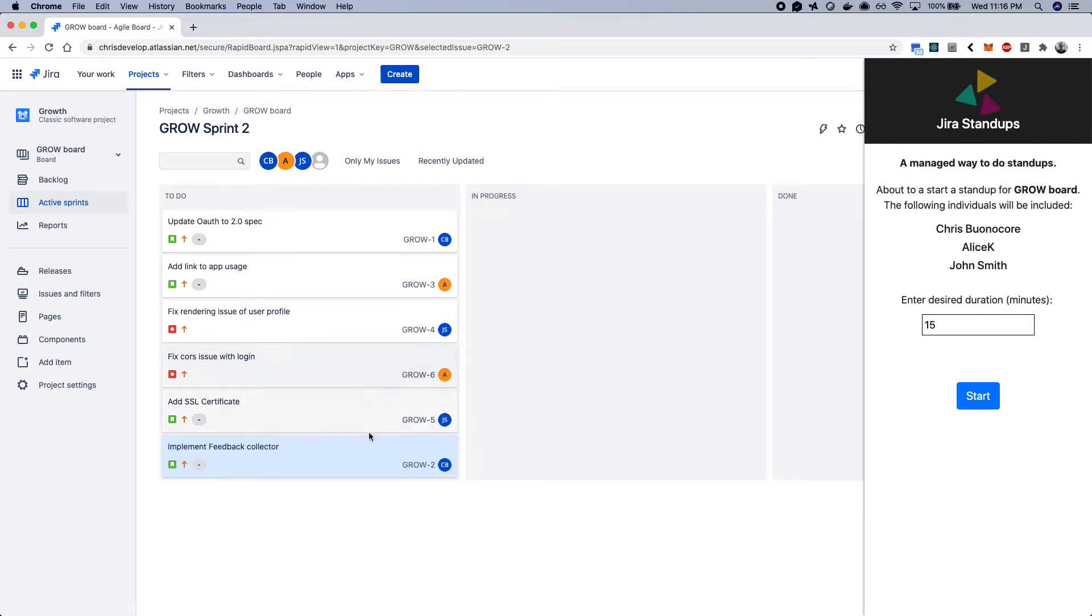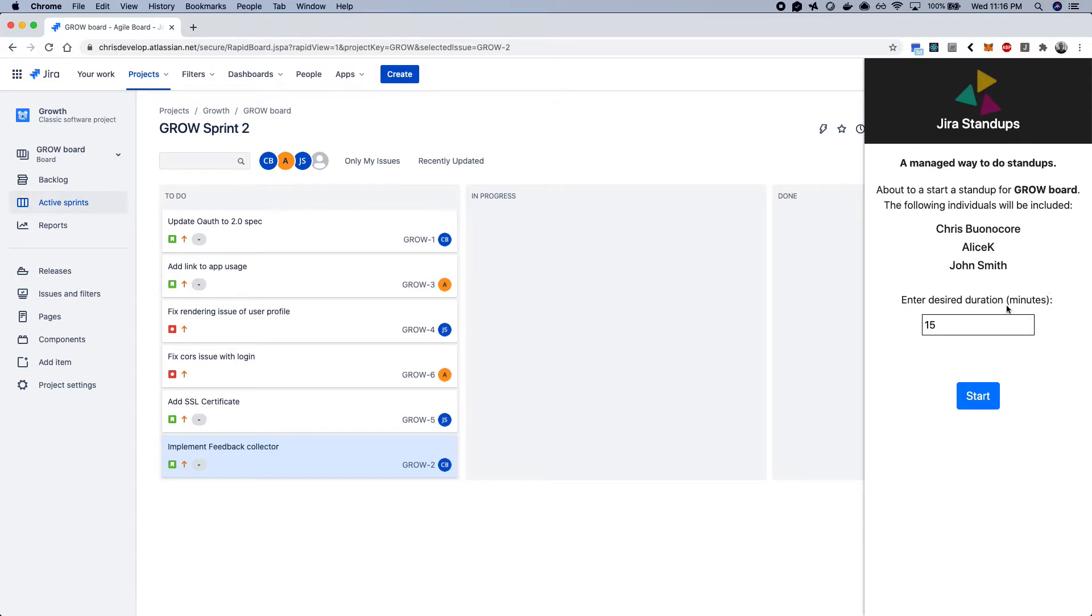It'll simply pull the list of active issues from this board or whatever board that's selected and figure out who's involved and who's working on active issues.